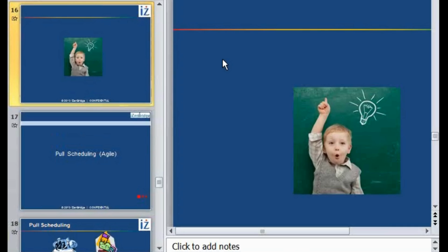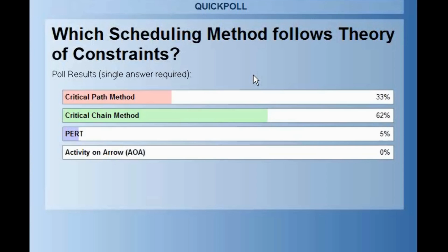The same way we need to identify which resource is constrained. Do we have limited developers? Do we have limited testers? Do we have limited business analysts? Theory of constraints says that whatever is in limited quantity, try to use that efficiently. Focus on utilizing that part of the project schedule or that resource, and it believes that if you do optimization in the remaining area, it can create more inefficiency than overall result improvement.